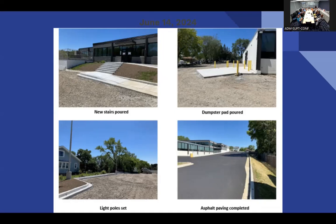There's a gate that gets added here. Actually, all 3 entrances, everyone but the clinic entrance. That one will remain wide open. Those are the pipes you're seeing on the ground. A City of West Dallas requirement is they no longer allow chain link fence in the district, so everything's decorative. 2 of the 3 have been procured. We're just waiting on that last one. It'll be about a week for install.